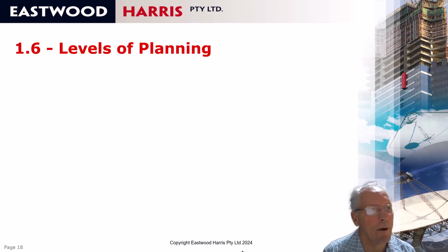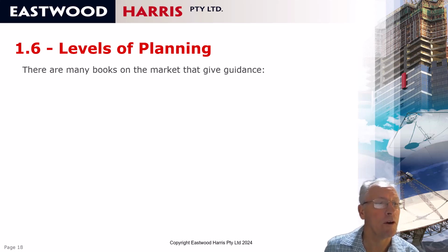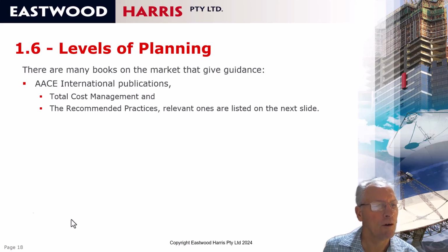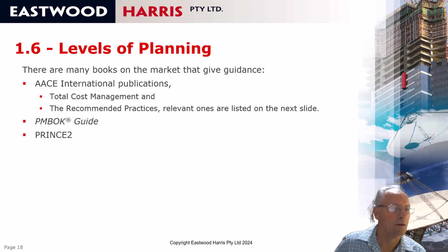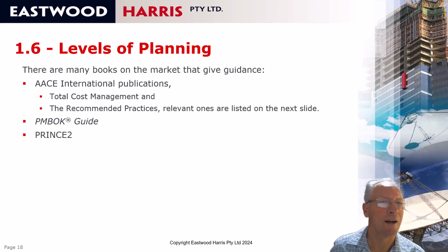You have a shorter program that's used to manage your subcontractors, and then often there will be more detailed programs like 2-week look-aheads. And therefore part of planning a project is for you to decide how often and when you're going to add more detail to the program, and obviously when you're going to update it. There are many books on the market that give guidance on how to do this. AACE International publications have total cost management and a number of recommended practices, some of them listed on the next slide. The PMBOK Guide and also Prince2 have some advice on how to granularize your projects and add more detail.